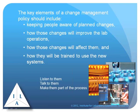I've dealt with cases where the people in the lab had no idea what was being done, and we didn't know that because we were contractors, and found out at the end of the project that they were resistant to signing off on it because they felt that their jobs were going to change or be adversely affected as soon as that project was put into place.